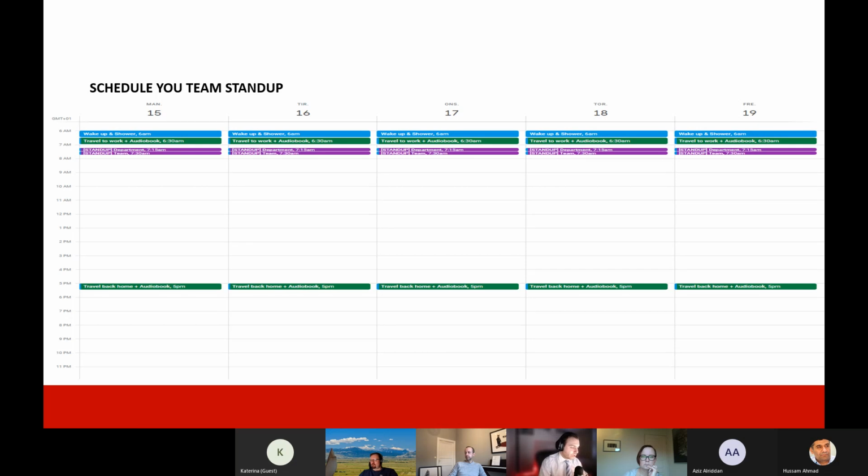Maybe you only need one stand-up where your department is your team, but if you are a part of the department, that would be two different stand-ups. And I also use the recommended time for a 2-week sprint, which is a 15 minute stand-up.